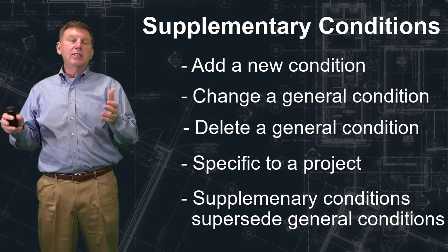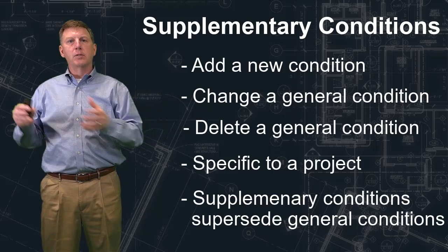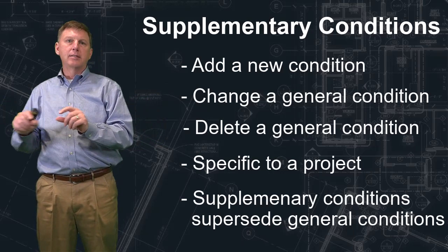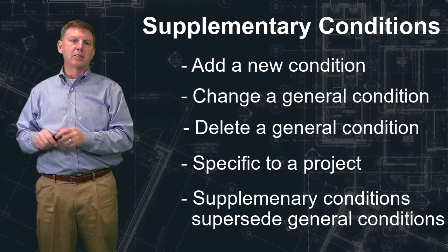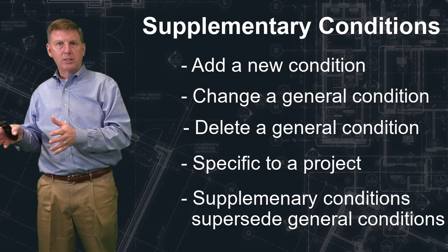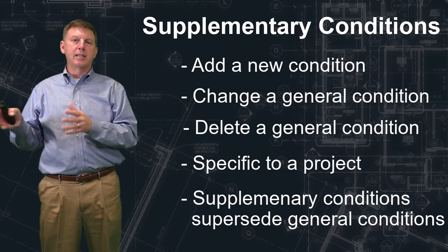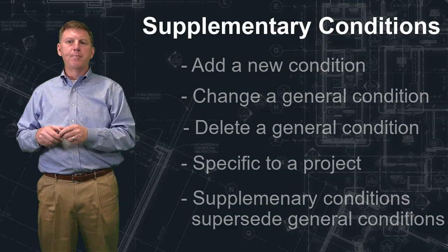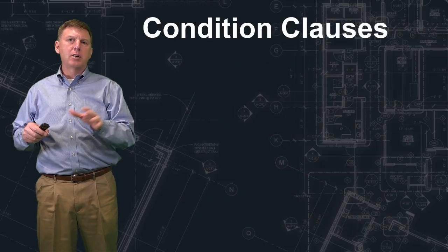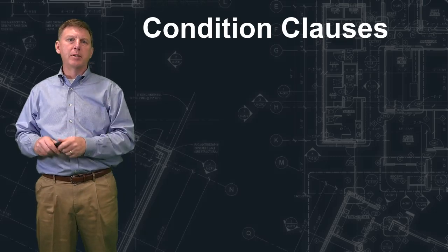So they also delete general conditions. There will be general conditions that don't apply to a project. So in the supplementary condition, it'll say delete this general condition or delete that general condition. In all cases, the supplementary conditions supersede, become more important than the general conditions because they are changing the general conditions. Now let's talk about some of the clauses that we're going to see in the general or supplementary conditions.